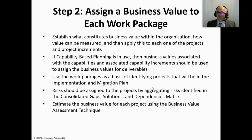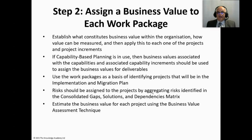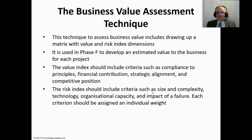Step two: assign a business value to each work package. We are assigning business value to projects, and at the strategic level — where we'd more likely do this — each project could be a work package within the strategic roadmap. You typically wouldn't use this technique down at the capability architecture level, as there would be many other factors that would negate it. This refers to the business value assessment technique, one of the migration planning techniques.